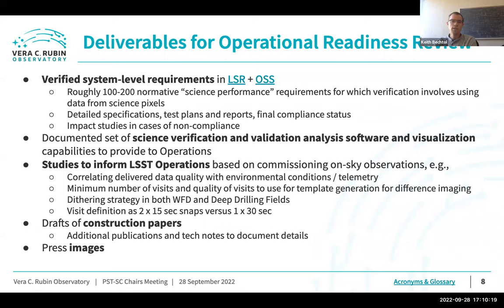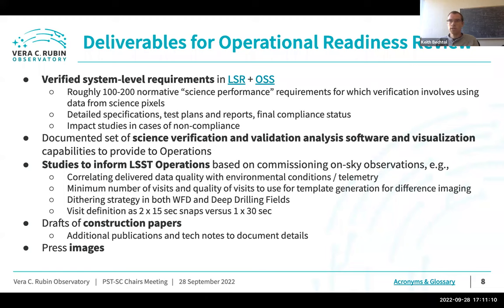We have a list of deliverables to have ready for the operations readiness review, which marks the transition between construction and the start of the 10-year LSST survey. The first is the verified set of system-level requirements from our top-level system requirements documents — the LSST System Requirements (LSR) and the Observatory System Specifications (OSS). There are something like 100 to 200 normative science performance requirements, with some overlap between the documents. That gives a sense of the scope of what we're trying to do.